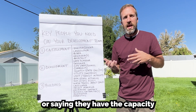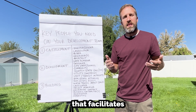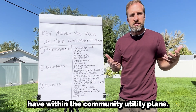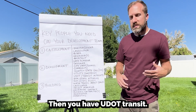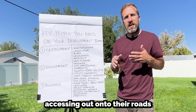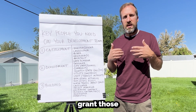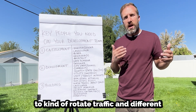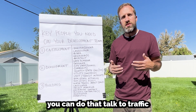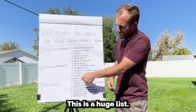Utility companies obviously need to be involved — they've got to provide a will-serve letter confirming they have the capacity for what you're proposing. You have to work with their team to design a plan that facilitates project success and maintains their existing utility infrastructure. Then you have UDOT and transit. UDOT has strict requirements for access onto their roads, so you want to make sure they grant the access needs for your project to manage traffic flow.